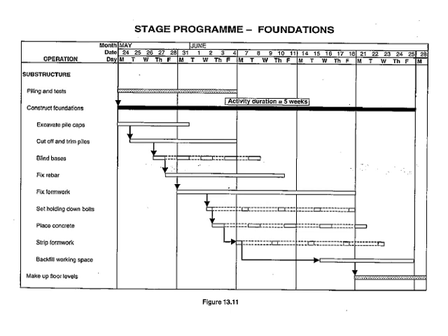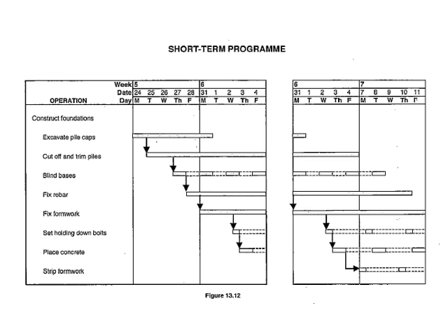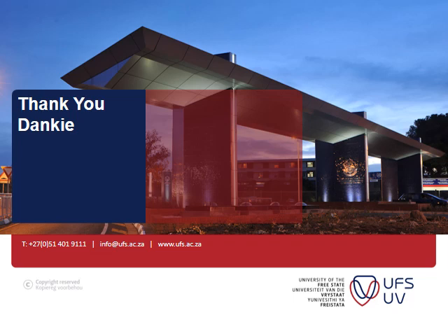So stage programs, for instance, now for foundation. So you can see it's your previous program just divided into further operational bits and pieces. Then you've got your short-term program, which is the same items just divided further into more detail. So you can see here it is actually divided into weeks and not months or years.